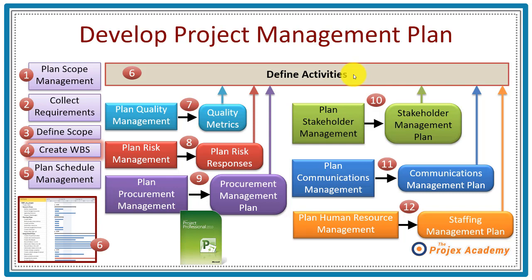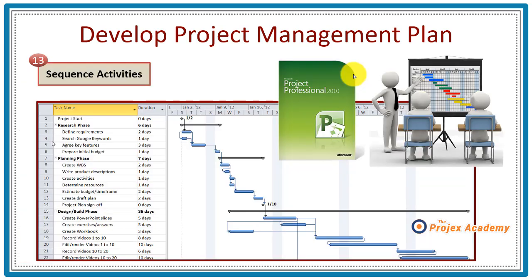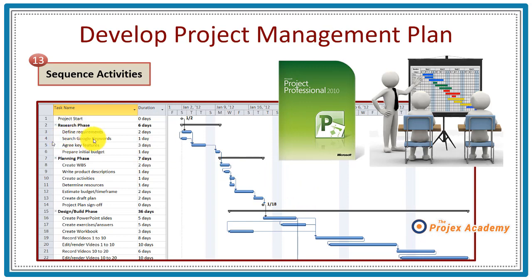Although steps seven through twelve are quite iterative and there's nothing sacrosanct about the sequence, what's important is that all of these are carried out and these activities are combined, which brings us to step thirteen — sequencing the activities. Microsoft Project will pay huge dividends here. As part of a planning workshop, usually using post-it notes — one for each activity — you work out the sequence and bring that back into the planning tool.